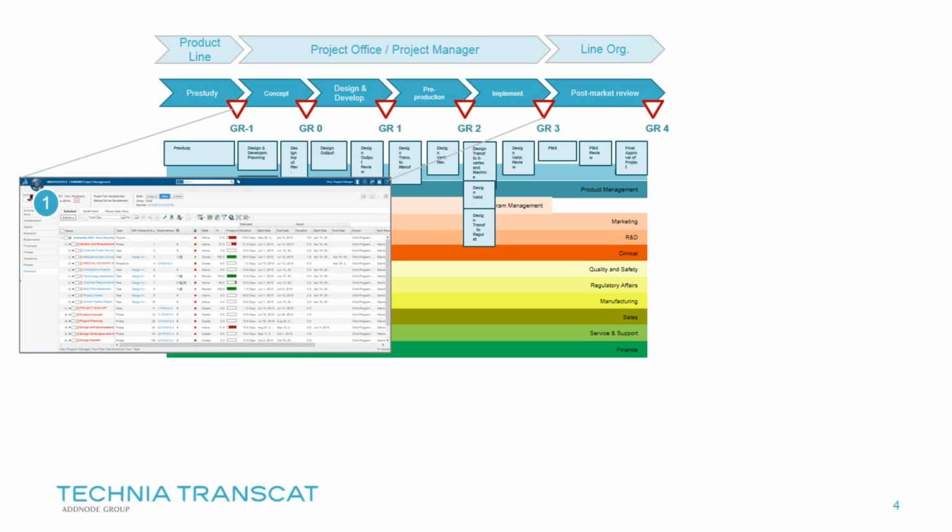During the planning phase, we'll set up the plan, and as part of that, we map the different deliverables. And of course, we have the product requirement spec, the subsystem requirement spec, the system requirement spec, any detailed specification. And we want to generate those specifications data-driven, so break them down into single requirements, and we want to have version control, revision control, and approval processes for the different requirements as they are mapped to the products and the projects. So that's the first connection.